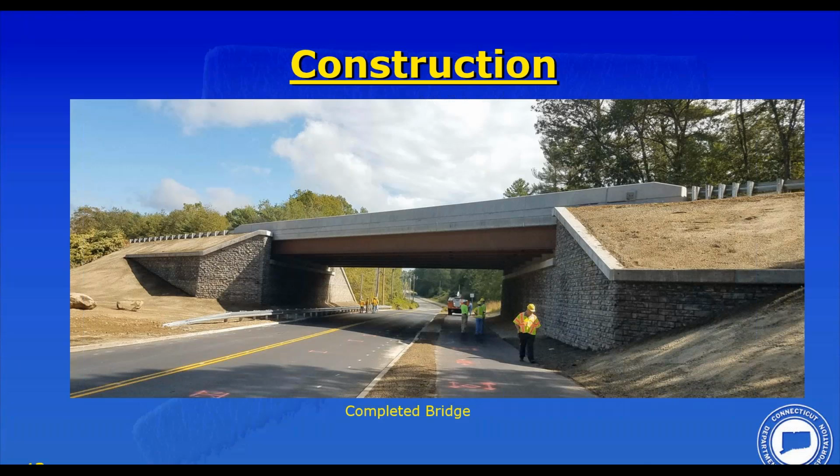the downside was infinity. So those are minor issues, and we worked it out. An addendum was put out, that was adjusted, and the project moved forward. Right, as I said, very minor issues. Yeah, and we've adjusted that in our projects. You know, that's not a showstopper. Well, yeah, I think the key thing, Tim, is that when issues were brought up by the contractors, the department responded and adjustments were made, and then we moved forward with the program.